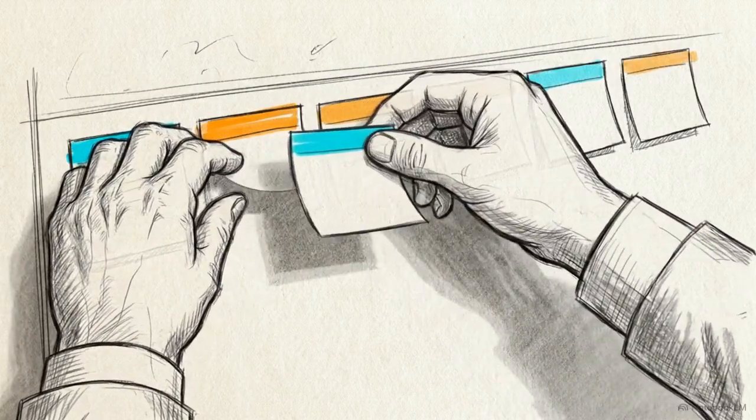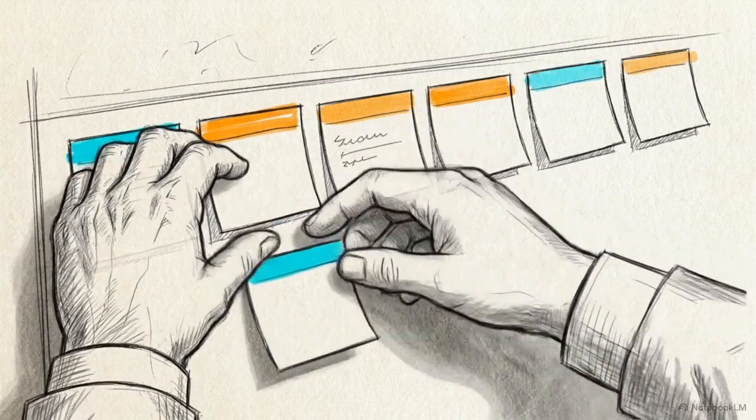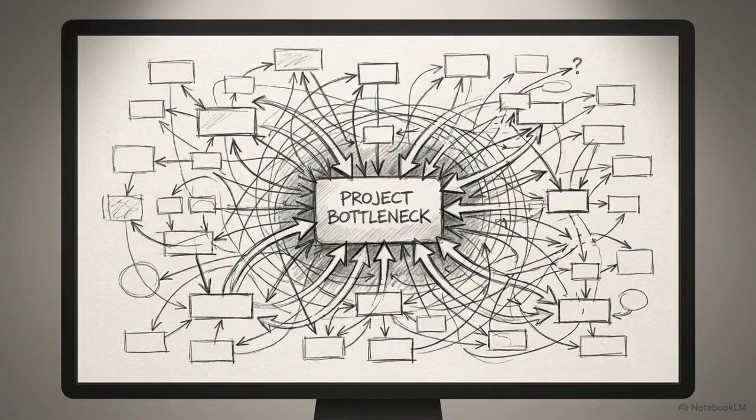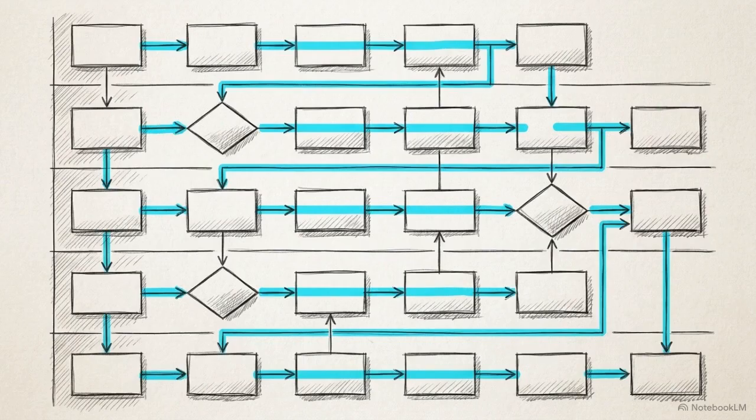Interrogate every sequential link. If a dependency is based on habit, run those tasks in parallel. Budget cannot fix a project that is sequenced incorrectly. You must fix the logic of the workflow before you spend additional money.